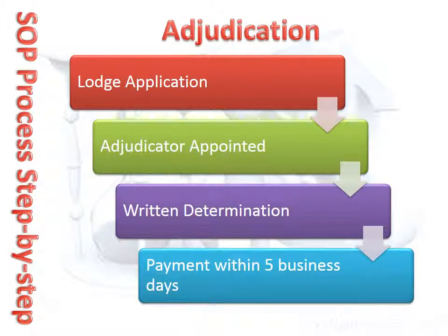Once the application has been lodged with the nominating authority and a full copy served on the client, the nominating authority will appoint an adjudicator. It is the nominating authority you and the client will deal with. The parties have no direct contact to the adjudicator unless the adjudicator requests a meeting. The adjudicator will be given a copy of the adjudication application and the adjudication response.